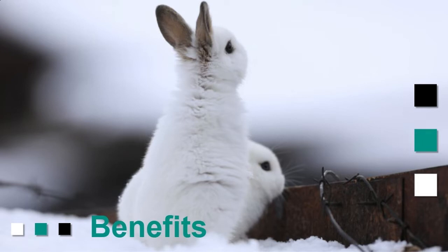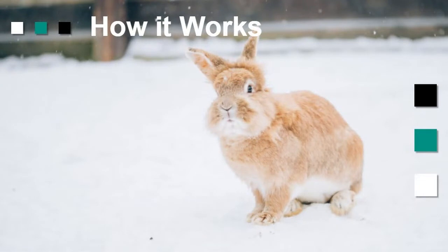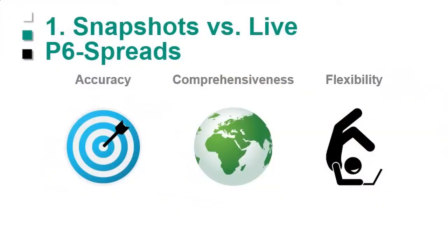When you're taking copies of projects, it does affect the way the resource histograms are produced, and there's steps that you're going to have to do, changing priorities, making them all what-ifs, things like that that you need to do to manage it. So again, we're just adding extra stress, if you will, extra steps for the schedulers to have to take care of. So P6-Reporter gets rid of that. It takes that stress away, and piggybacked with P6 Calculator with automations, it really takes that stress away. So let's look at how it works.